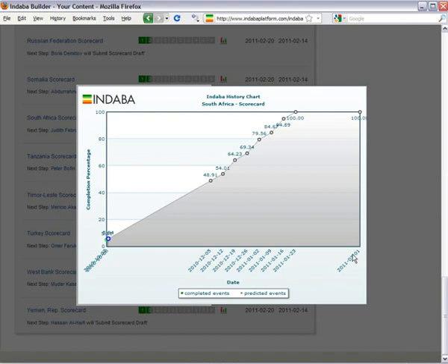And over here you have a time axis, and then up here you have the % completion for that particular document. And the reason we can measure this is because it's going from all these different people, and the different people have assignments with different lengths of due date. So we use that to get a yardstick for how much work actually has to be left on a document in person days. So as we go on, you can see this goal that's being worked on right now is a big one because it's going to take about 2 months to complete. That's the initial authoring of this particular data set.